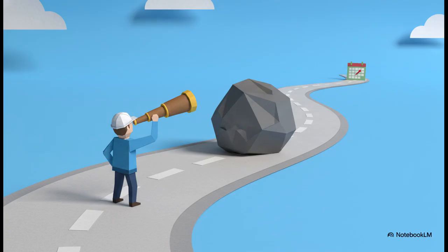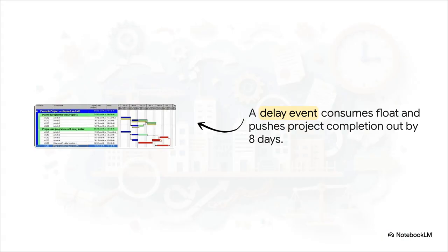The key thing to remember about it is that it's a forward-looking technique. You're not looking back with 20/20 hindsight. You're creating a model to forecast what the impact of that delay is going to be on your final completion date. And this visual just explains it perfectly.